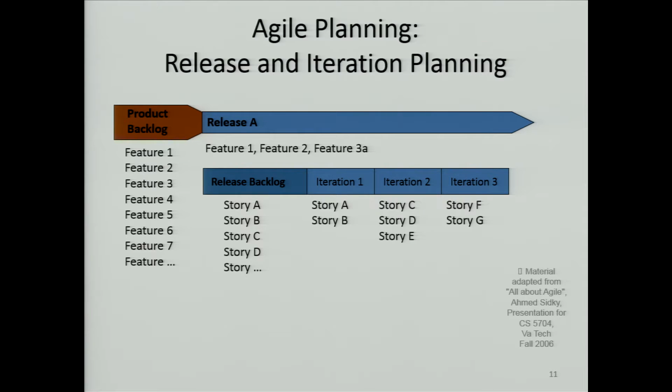Do a few, 3 sprints, and that gives you a release. Then that goes to the customer as more usable software. One of the things that we often see is that there'll be 2 iterations, 2 sprints that are developing code, and then the third might be a cleanup kind of a sprint where we're doing integration and getting stuff ready to deliver.